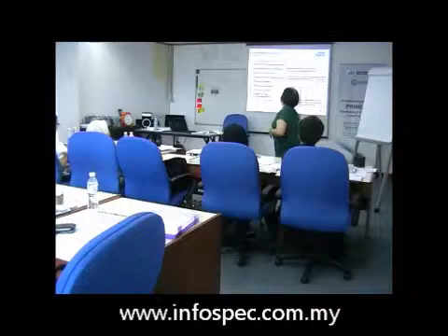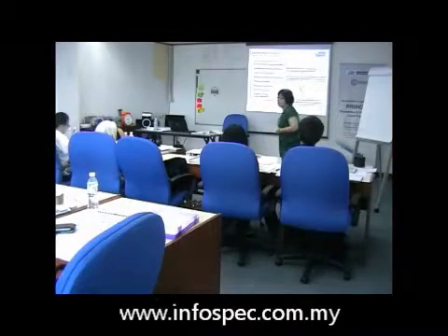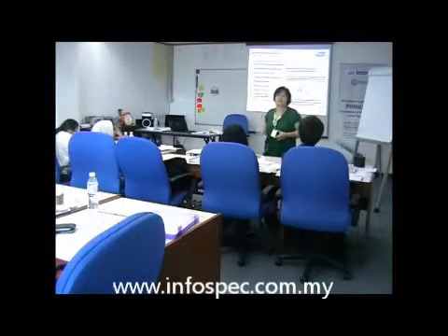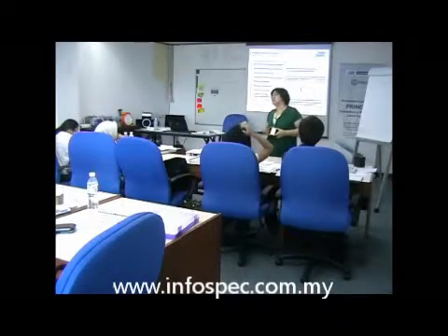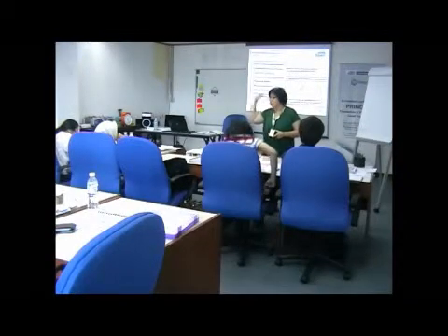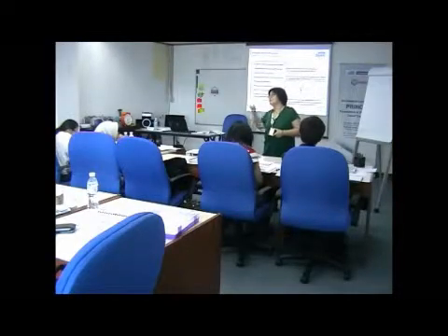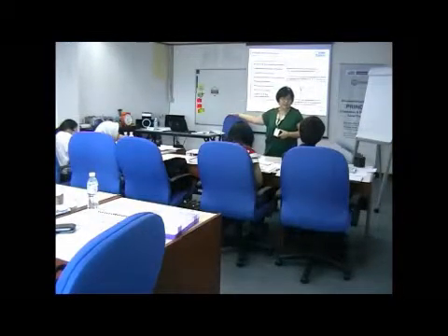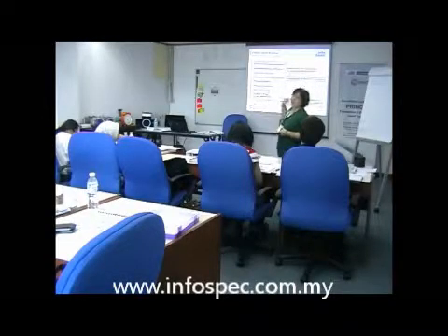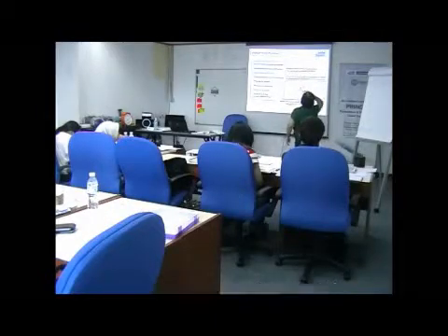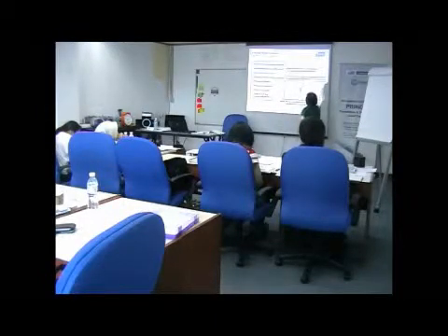That's why you want to control the changes. It's not that you cannot change. It's that the change has to be justified. Every change that is being approved, you need to examine what the consequences are. Will it impact my business case, the benefits of my business case? Will it impact my timeline, my cost, and everything else? Okay, so that is being handled by the change team. So you need to control the changes.